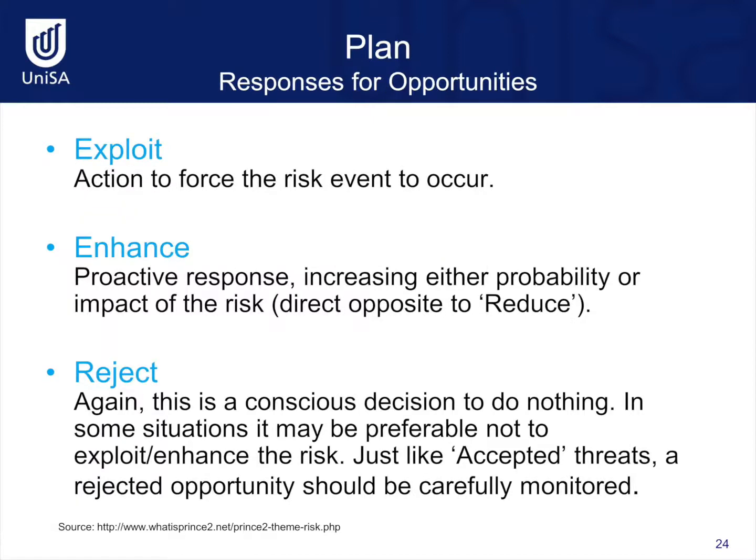The previous slides provided details about the responses for threats. Here are some responses for opportunities. An exploit response results in action to force the risk event to occur. An enhance response is a proactive response, increasing either the probability or impact of the risk, which is the direct opposite to the reduce response. A reject response is a conscious decision to do nothing. In some situations, it may be preferable not to exploit or enhance the risk.